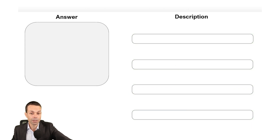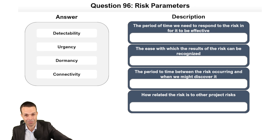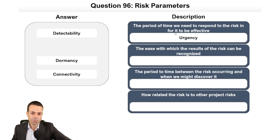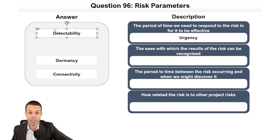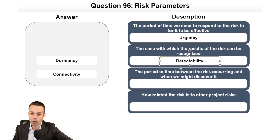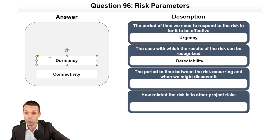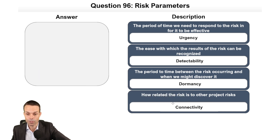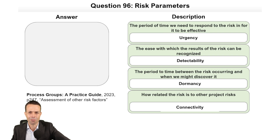Now risk parameters: the period of time needed to respond to a risk for it to be effective is urgency. The ease with which results of the risk can be recognized is detectability. The period of time between the risk occurring and when we might discover it is dormancy. And how related the risk is to other project risks is its connectivity.